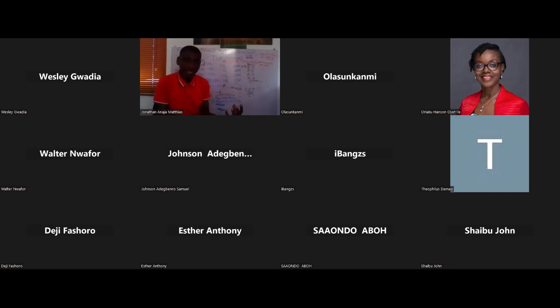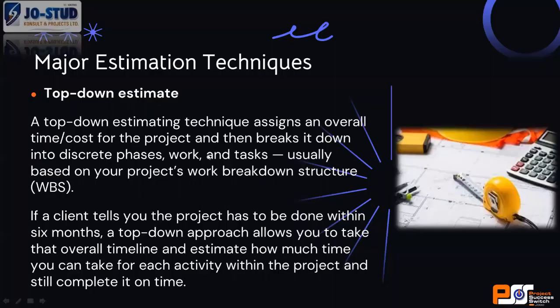How about exploring that? You wanted to use maybe a dual flush WC. How about using a single flush WC? Now you go back to the client until you are able to tell the client that, okay, for us to meet this your 200 million, let's make a compromise on some work packages. All right, does that answer your question, Architect Oriako? Yes, thank you. Okay, good.